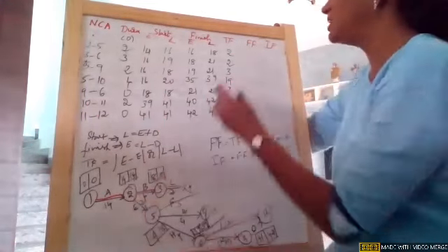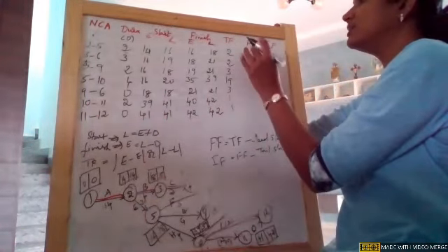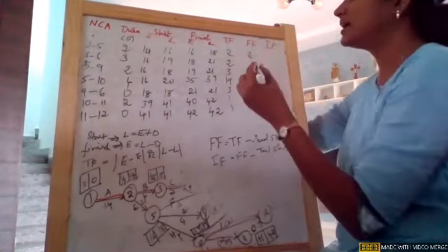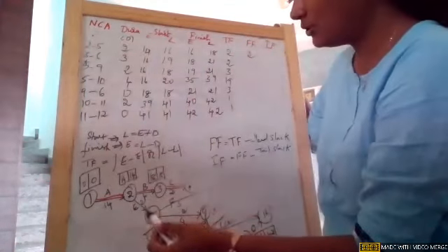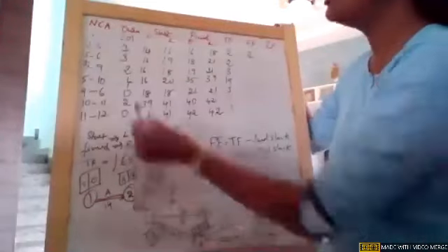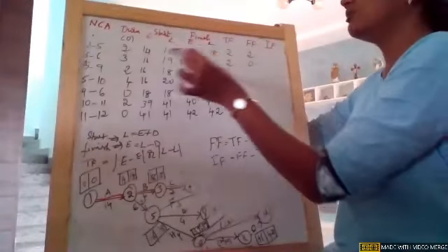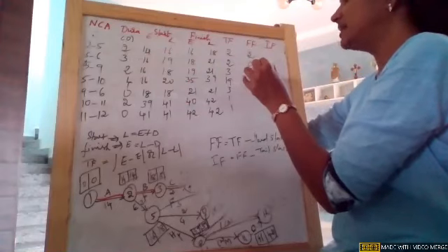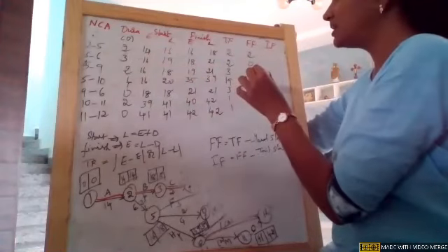Now 14 minus 14 is just 0. So 2 minus 0, it is 2. That is what we are trying to say. Then on node 5, the slack is 2. 16 and 18, the difference is 2. So here 2 minus 2, it is 0. 3 minus 2, it is 1. 19 minus 2, it is 17.